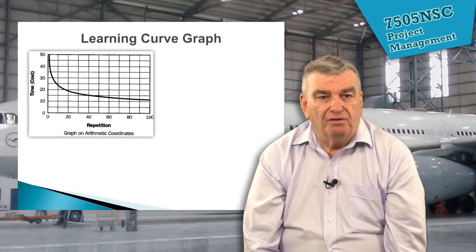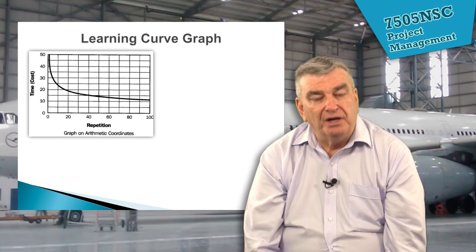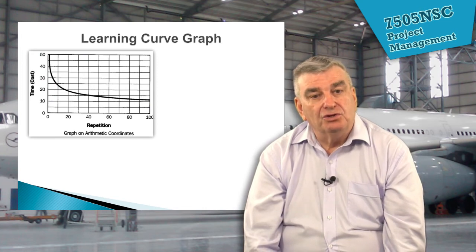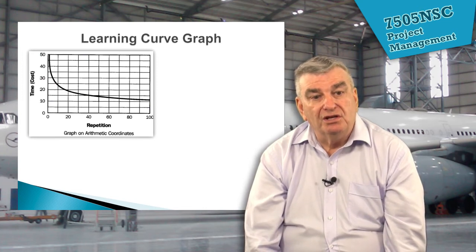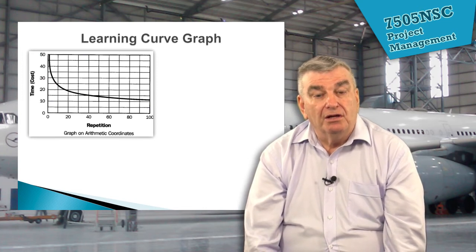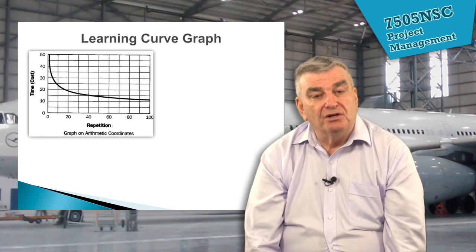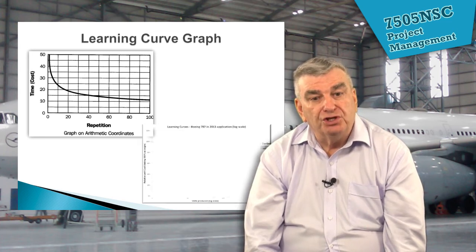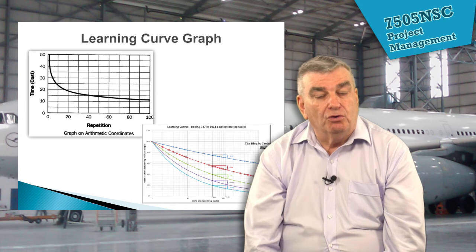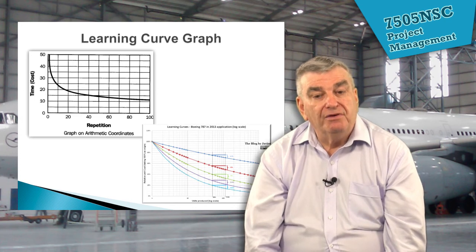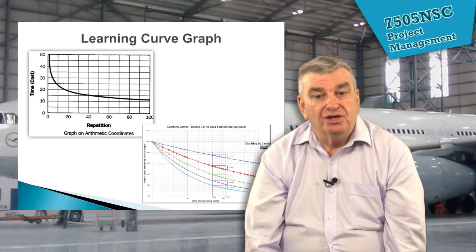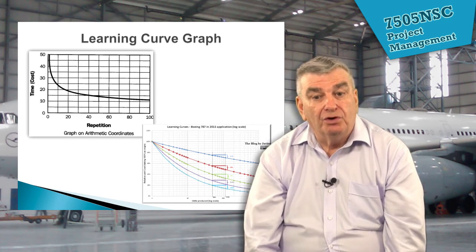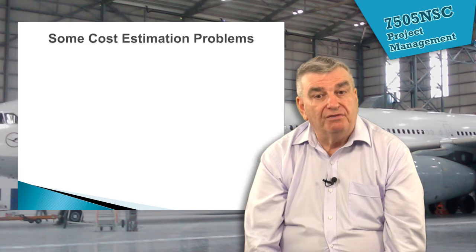We'll take a look at the learning curve graph. This graph simply says that the more times we repeat a certain activity, the more we learn and the more efficient we become. We can see this learning curve applied in a real-world case with the Boeing 787.